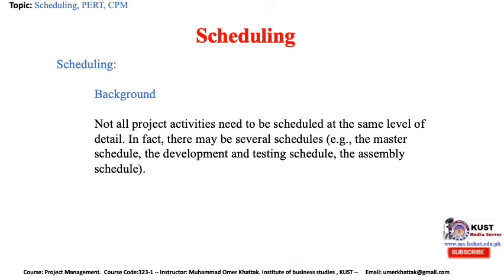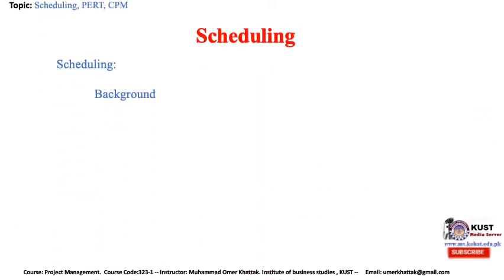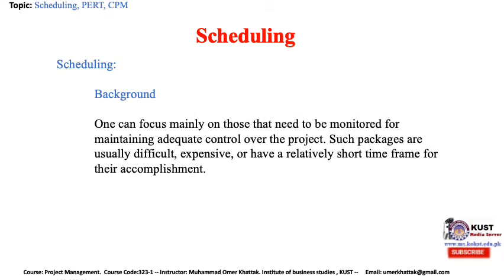Not all project activities need to be scheduled at the same level of detail. In fact, there may be several schedules — for example, the master schedule, the development and testing schedule, and the assembly schedule. These schedules are typically based on the previously determined action plan and work breakdown structure. It is good practice to create a schedule for each major task level in the WBS that will cover the work packages. One can focus mainly on those that need to be monitored for maintaining adequate control over the project. Such packages are usually difficult, expensive, or have a relatively short time frame for their accomplishment.